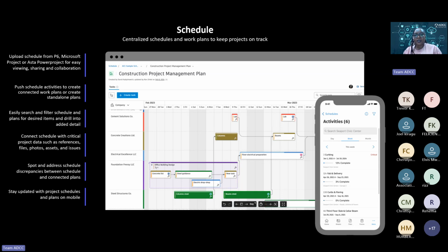And seeing as when you have the schedule offline, you have to be the one to keep doing the follow-up. But when you break them down within Autodesk Build and assign those tasks to different stakeholders, subcontractors or contractors, then they will receive automatic prompts that this work should have been completed 2 days ago, that then necessitates them to either give an explanation or rush up on that particular task.